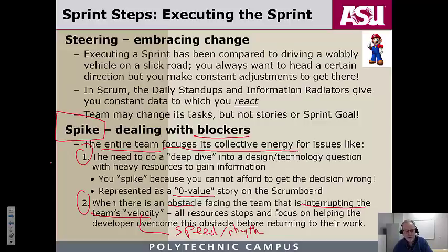Technically, you may decide that the sprint has already failed, that even though maybe you're 1 week into a 2 week sprint, the blocker is so significant that you're not going to be able to meet your obligations. You're still obligated to fail fast. So you're obligated to say, we're going to stop the sprint, we're going to replan, we're going to get back on track by basically setting up a whole new sprint and doing a reset. But of course, at that point, you've got to bring in your stakeholders, you've got to bring in your product owner slash customer, and go through that process again.